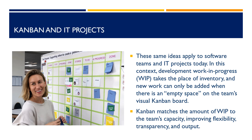These same ideas apply to software teams and IT projects today. In this context, development work in progress takes the place of inventory, and new work can only be added when there is an empty space on the team's visual Kanban board. Kanban matches the amount of WIP to the team's capacity, improving flexibility, transparency, and output.